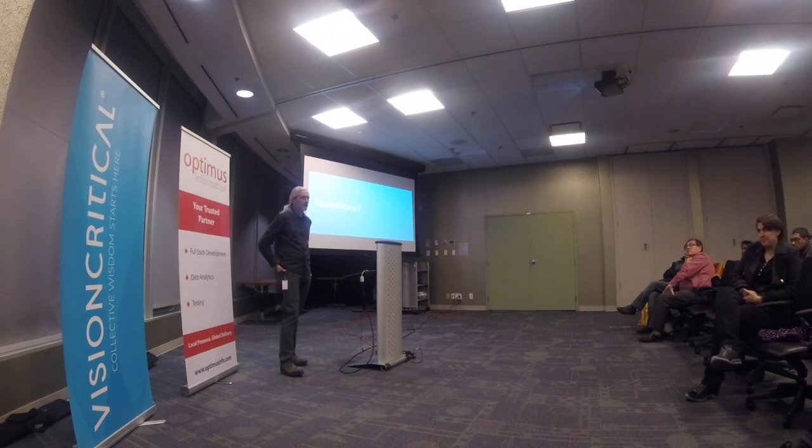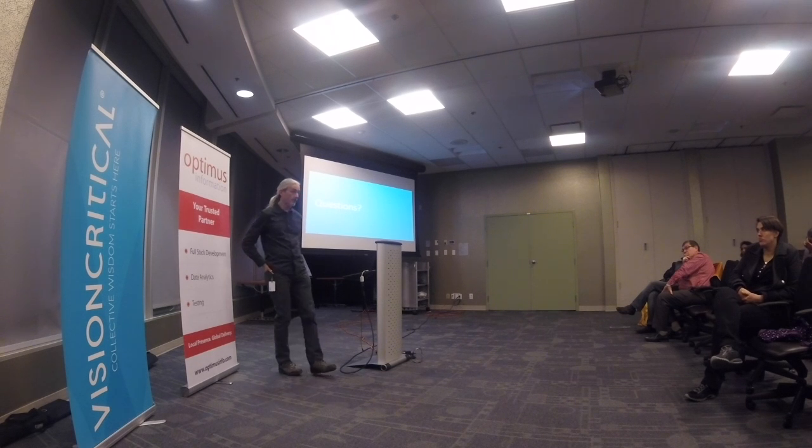What that really means is you get the person who's asking for that thing, so in our case, a PM or customer requirement, if you like, the person who's going to develop the solution, and QA in the same room. And you're talking about those requirements in a way that lets you fully understand what the customer wanted and why they wanted it, and I talked about the benefit and value statement of really understanding that. And then being able to use that to say, okay, we're going to write some tests at that time, before any code is written at all, using the understanding of the ACs and of that customer need and requirement.